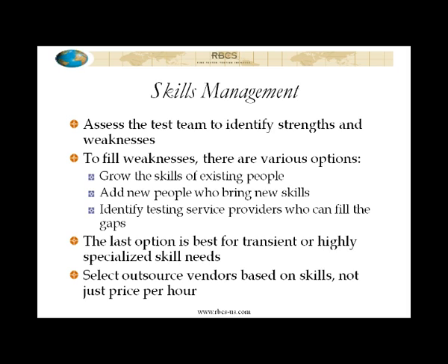Now, one simple scale that I've used before is a 0 through 3 rating, where 0 is the person knows nothing about this, right? They just have no knowledge whatsoever in this particular skill area. A 1 would mean they have some basic knowledge and they can carry out simple tasks that require this skill if they have someone available to help them. You can go and ask questions when they get stuck.